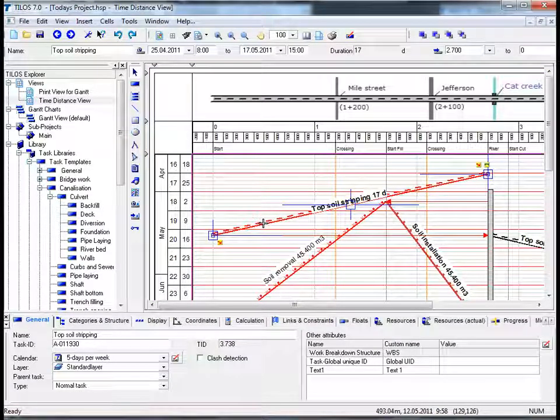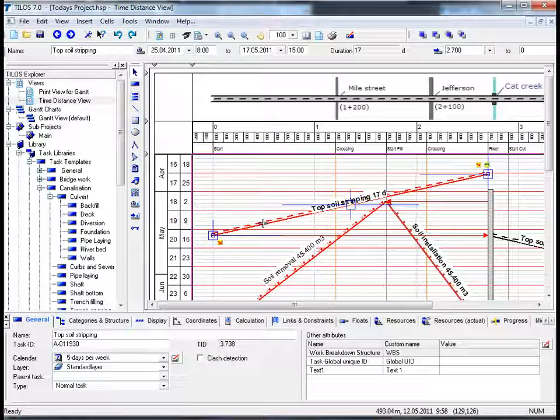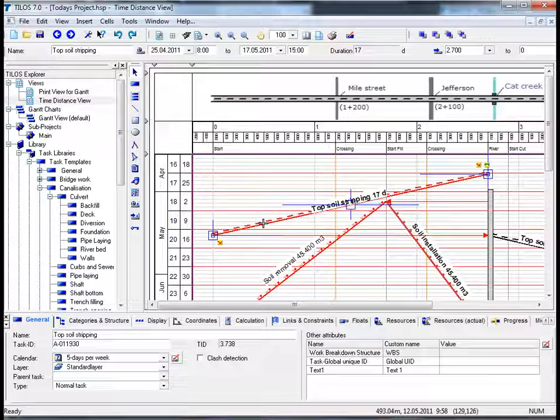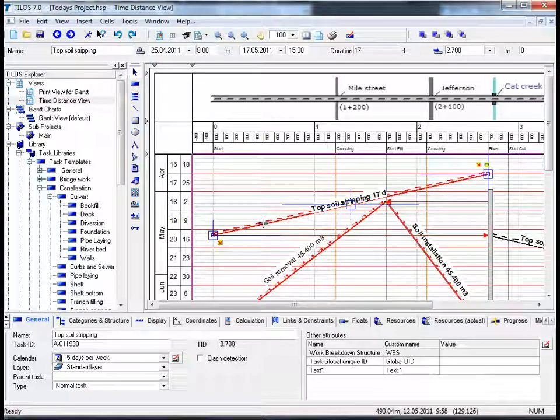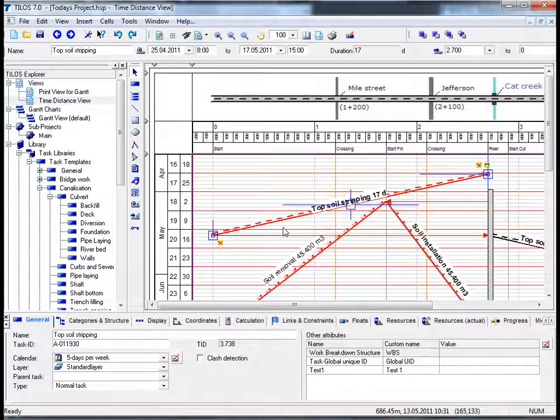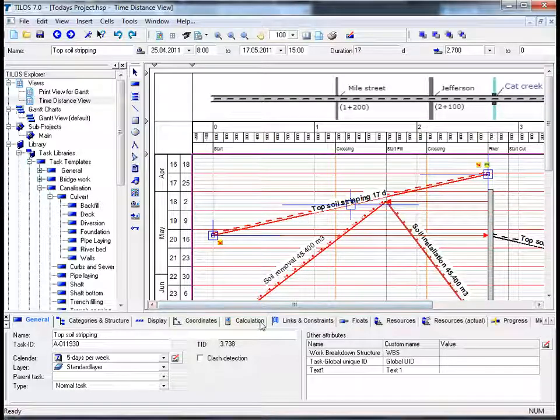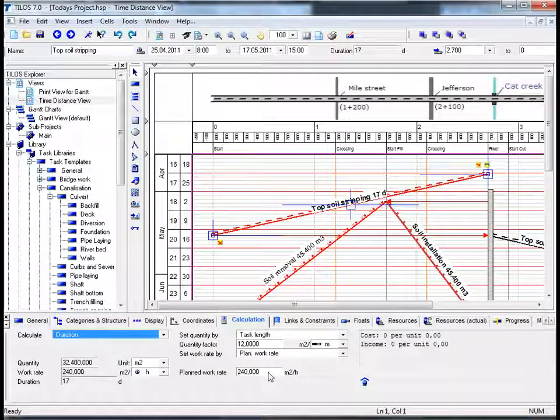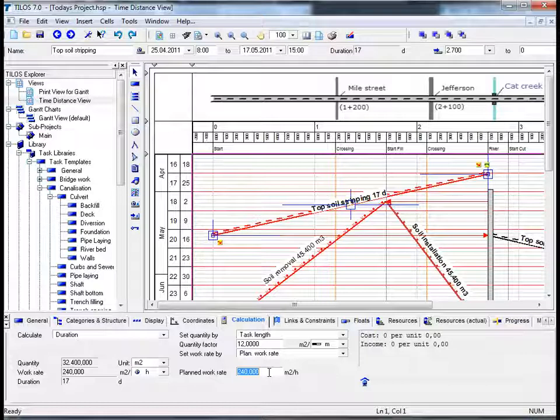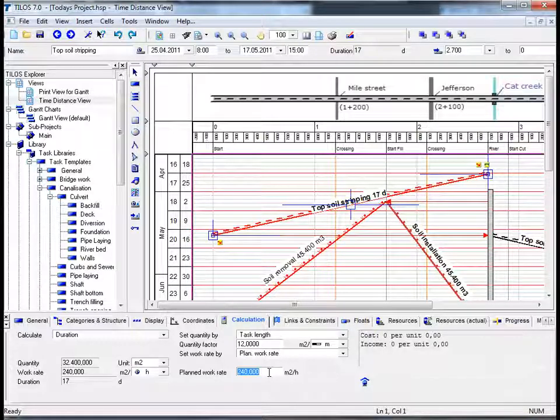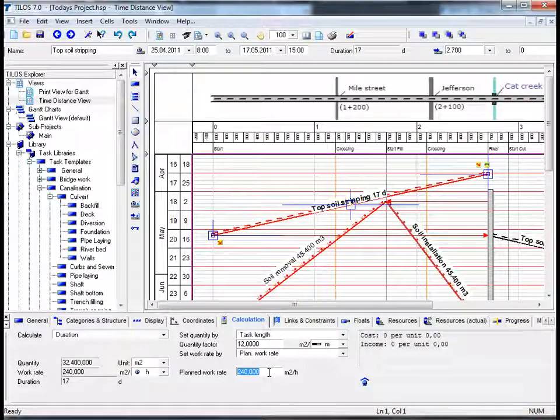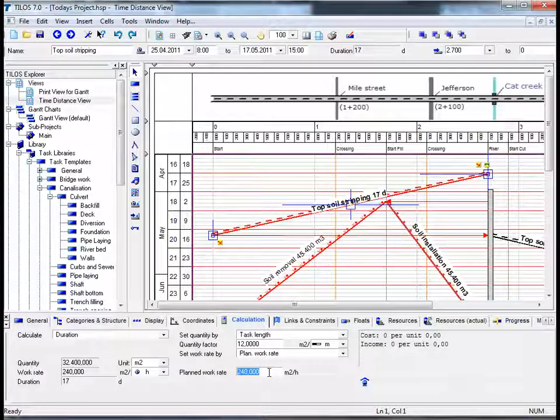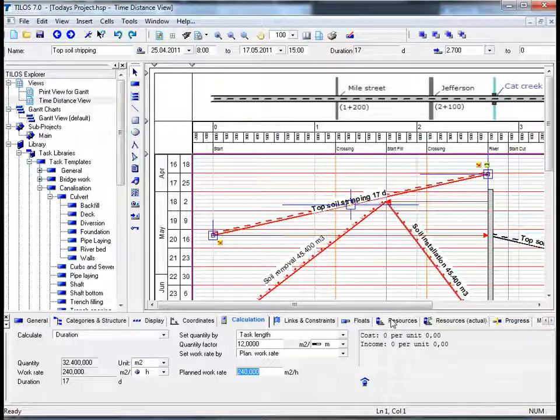From the previous session we learned that it is possible to estimate the duration of a task to be carried out without resources solely on the basis of quantity and work grade. If we move on to the calculation view tab in the details toolbar, we can see that in this specific case it was 240 square meters per hour which had to be achieved. We now want to move along to the resources view tab in the details toolbar.